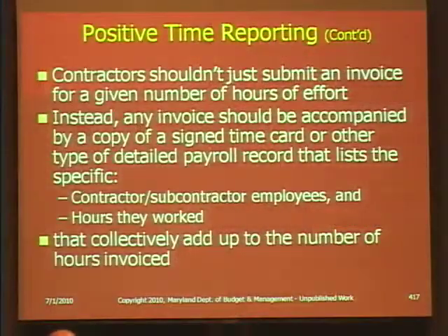Okay, contractors, again, going to the issue of positive time reporting and what we are advocating. Contractors shouldn't just submit an invoice for a given number of hours of effort. Instead, any invoice should be accompanied by a copy of a signed time card or other type of detailed payroll record that lists the specific employee of the contractor or subcontractor and the hours they work, and that the summation of all the employees and all the time comes up to what's on the invoice.